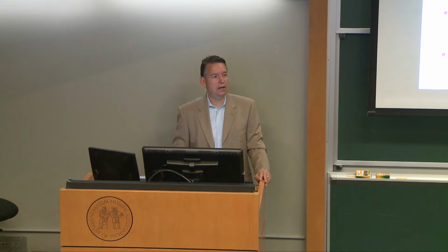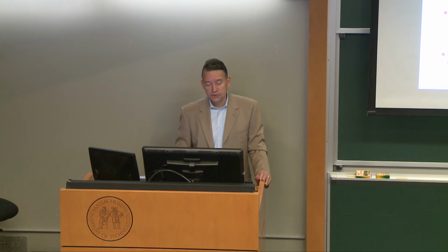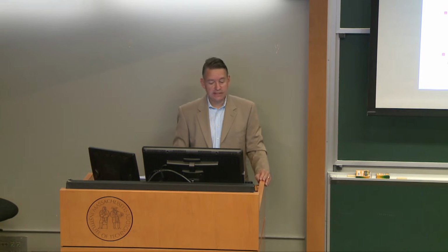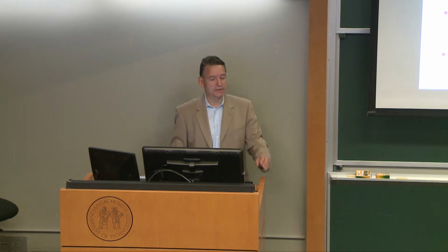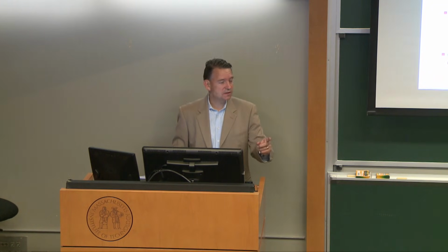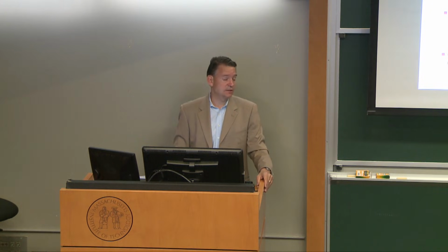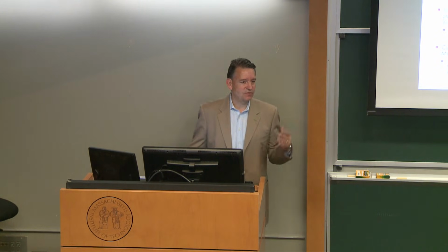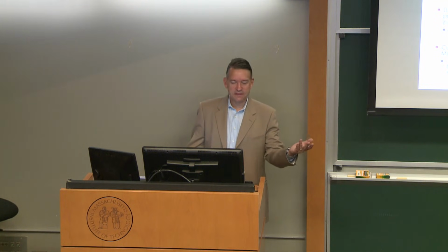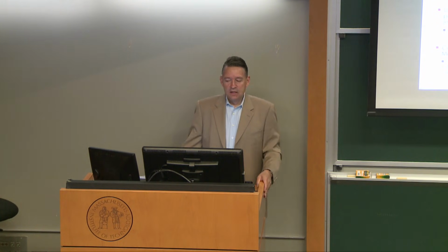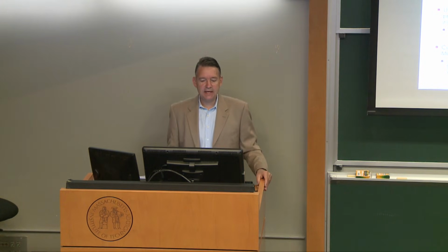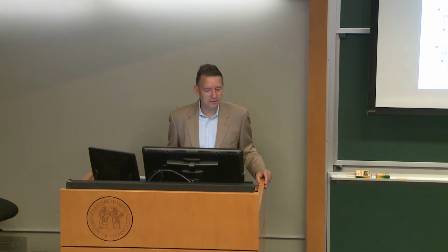The other thing I want to say is this is really a critical issue, and a lot of the problems we talked about last time, schedule, cost overruns, a lot of these things are traceable back to the requirements. Either the requirements were over-ambitious, you set requirements that were essentially unachievable, or you missed requirements that actually became clear later on, but they weren't written, so nobody paid attention to them. A couple examples. I have one example of poor requirements, and then a good example. This is a mission that you may have heard about.